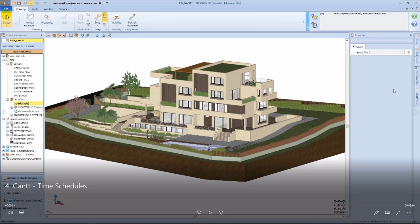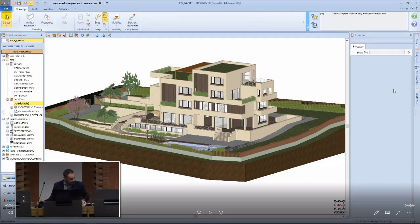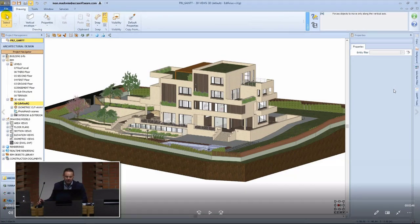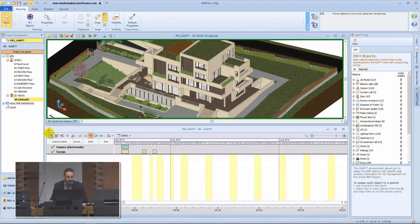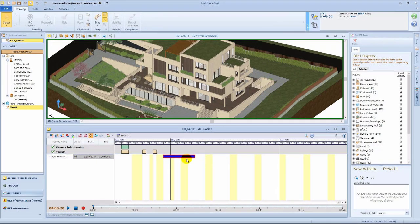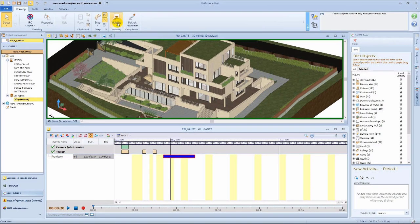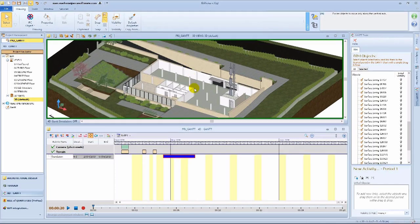The next feature is the Gantt and time schedules, which is also an integrated environment within Edificius. Taking a project without time schedules is like taking a journey without a map — at some point you're going to get lost. We do this with a 4D Gantt environment. Dealing with objects, we can create a timeline with various activities spanning across a certain number of days within the construction process. We can define each activity and concentrate on specific parts of the building, linking objects to the timeline in the Gantt chart.